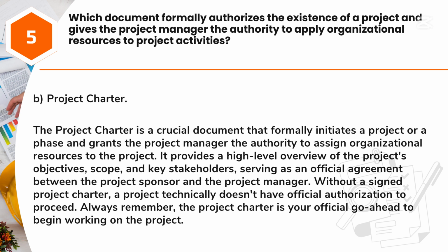Answer: B. Project Charter. The project charter is a crucial document that formally initiates a project or a phase and grants the project manager the authority to assign organizational resources to the project. It provides a high-level overview of the project's objectives, scope, and key stakeholders, serving as an official agreement between the project sponsor and the project manager. Without a signed project charter, a project technically doesn't have official authorization to proceed. Always remember, the project charter is your official go-ahead to begin working on the project.